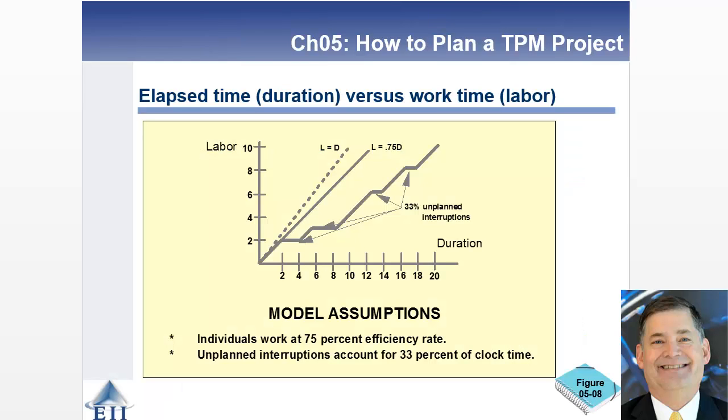So when you talk about time, there are really two different components of that. You're looking at what's the duration that it's going to take, how much elapsed time measured perhaps in hours, days, weeks that it's going to take to accomplish a particular task, given that that duration has to account for people taking leave and going on vacation and people getting sick and all sorts of other components that are going to interrupt them actually working on it, versus the amount of work time.